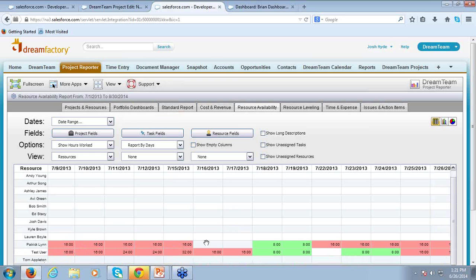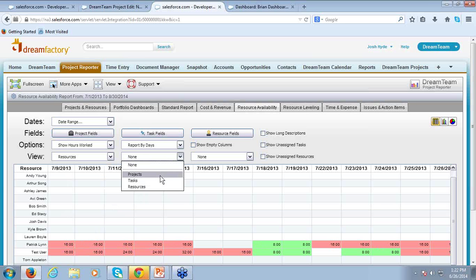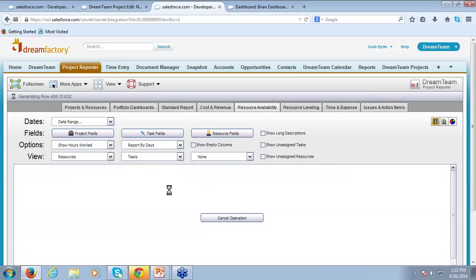To show you the resource availability and resource leveling reports — these two really rely on the DreamTeam calculation engine. As we look at resource availability, it does color coding: eight hours or fewer shades in green, eight to twelve hours highlights in yellow, and anything beyond twelve shades in red. In our demo org, we have some real workhorses. I can get a breakdown of where these hours are coming from and see exactly where any of my resources exceed eight hours a day.